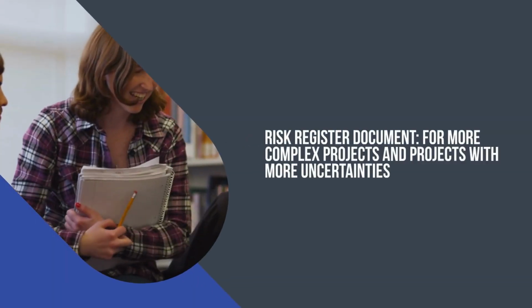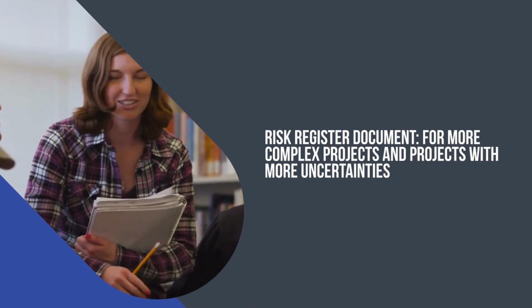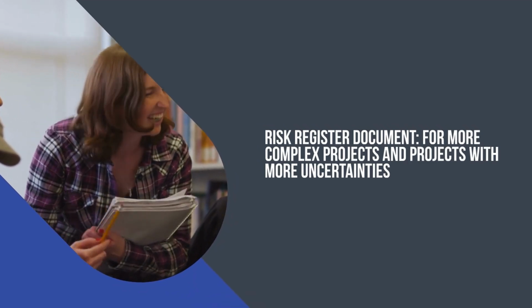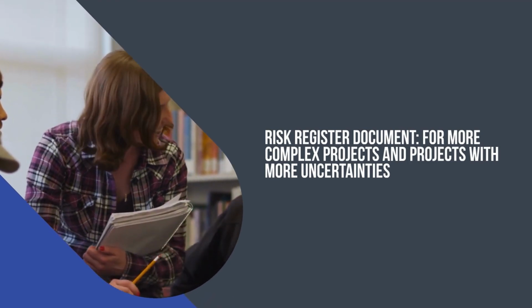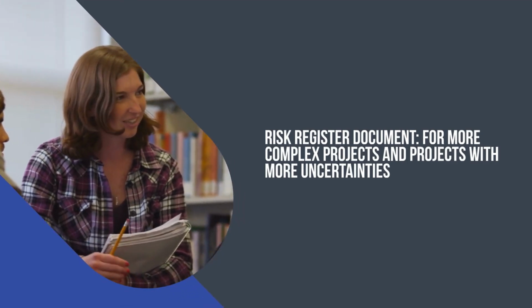For more complex projects and projects with more uncertainties, a risk register document provides a more formal and more detailed identification of risks and the plan for addressing them. Similar to a red flag list, the risk register provides project managers with a list of significant risks.